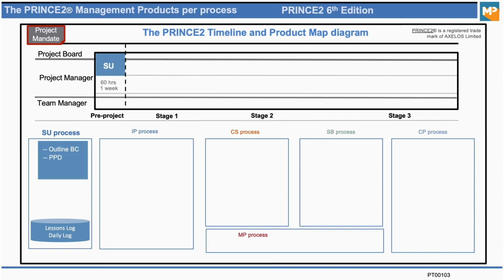So what does the project manager do next? Well, they create what we call a project product description, PPD for short. This is like a high-level document which describes the main output of the project. Okay, so if we're building an apartment block with 6 apartments in it, it will describe, in 2 pages or a page and a half, what that output will look like. So it's a major project output document. It will describe the main output which we're trying to work on. It could be from half a page to a page and a half to 2 pages.